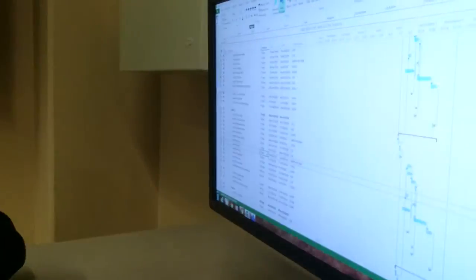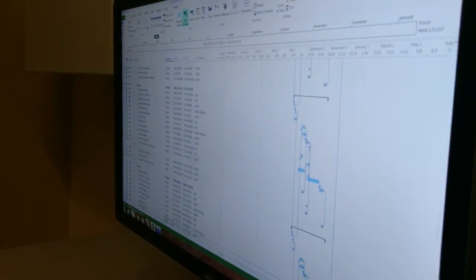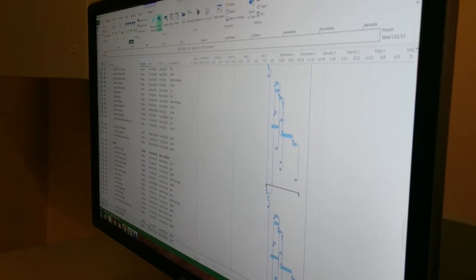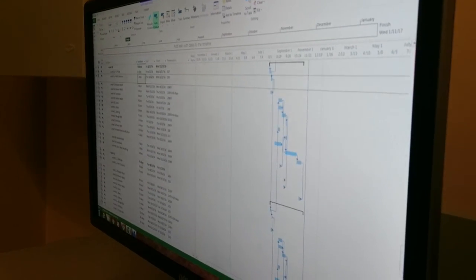Scheduling — this is actually where we put our thinking caps on. We use lean principles, assume a just-in-time delivery technique, and build the schedule with the least possible idle time for the crew. This meant multiple parallel activities running efficiently and also in a logical and pragmatic sequence. We used Microsoft Project to build the schedule, and our work experience really helped a lot here.